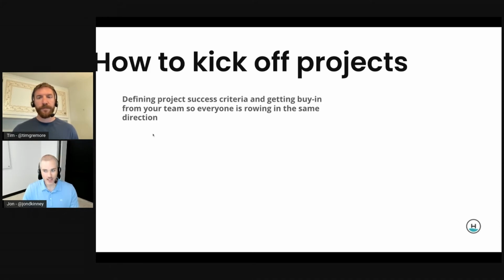So a lot of times for us at Headway, we're selling a duration of time, right? So we've got a weekly rate. We know if we need a team of 4 generally to be able to execute on this size of project, or maybe it's a team of 6 or 8, we'll understand the burn rate for that team for that duration of time. And if we feel like what we want to achieve is about a 2-month build or a 3-month build, we'll understand then our timeline and our budget.